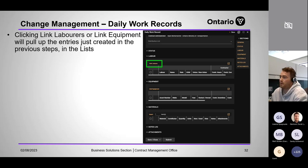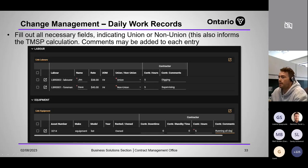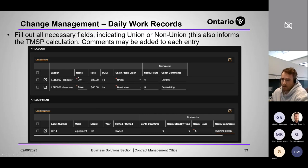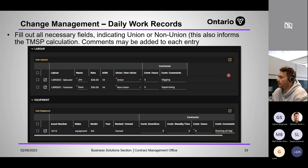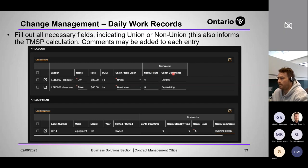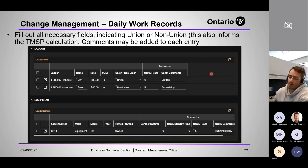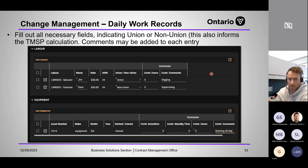Here's an example DWR. Laborers are listed with their names — Jim and Dave — and whether they're union or non-union. The name is a requirement per the general conditions definition of a daily work record, as it includes the name for purposes of reconciling the work. You enter the hours; there's also a blank space where the inspector fills in their hours and comments. So you'll have contractor hours and comments, then inspector hours and comments — like handing a carbon copy DWR slip to an inspector.